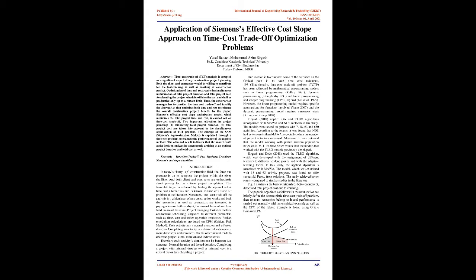Project management looks for the best economical scheduling subjected to different parameters such as time, cost, and other operational resources. Project scheduling calculations are based on CPM, critical path method. Each activity has a normal duration and a forced duration. Completing an activity in its forced duration needs more direct cost and resources. On the other hand, it leads to a decrease in the project's total duration and indirect costs. Therefore, each activity's duration can be between two extremes: normal duration and forced duration. Completing a project with minimal time as well as minimal cost is a critical factor for scheduling. One method is to compress some of the activities on the critical path to save time-cost (Siemens, 1971).